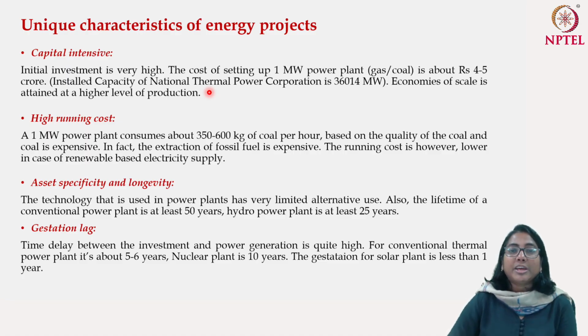So in case of a power plant, if I invest today, I can't expect an outcome down the line within a month, or probably not even within a year. So the gestation lag, the lag between the investment and the generation of revenue, is quite long in case of power projects. So if you take an example, for the conventional thermal power plants, it's about 5 to 6 years. So if you start building the power plant today, you have to wait for at least 5 to 6 years in order to produce power, to sell it in the market, and therefore to generate the revenue stream. However, if you think about the solar power, then the gestation lag is quite less. It's actually less than 1 year.